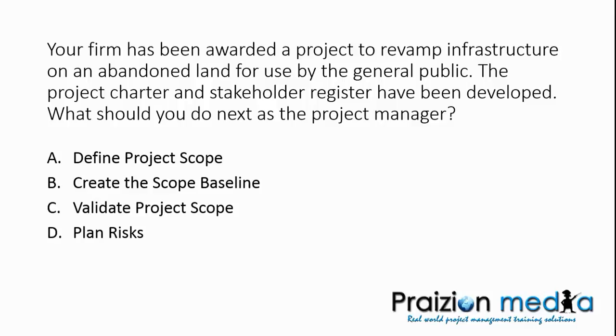Okay, so what should you do? Should you define project scope? If you guessed that, you are correct. That is the first thing, the most sensible thing to do. Know your scope. Know what the project is all about. Know the parameters of the project, the boundaries, the inclusions, the exclusions, the constraints, the assumptions. Know what's at stake. And then you'll be in a better shape to do that. Of course, there are other things that you need to do before you carry out plan risk management, but this question zeroes in on scope. Well, if you got that one, here's another one.